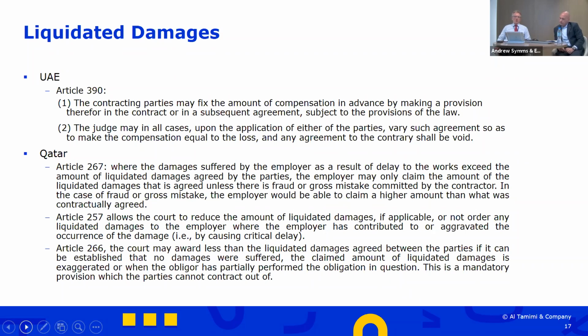In its unamended form, what it says is that the liquidated damages are to be the exclusive remedy, and that's wholly for delay, and that's wholly consistent with certainly a common law interpretation. Yet FIDIC, interestingly, then adds a few extra words, which says, except in a case of termination by the employer. So, back to some of those thoughts that Ewan was expressing relating to the dangers of termination for a contractor, that potentially, if there is a valid termination by an employer, the apparent protection of the liquidated damages figure may be removed completely so that there is an exposure to general damages. But then there is another important aspect from the employer's side, and Ewan's already addressed it, and that is get your liquidated damages claim in, coupled with whatever you might be able to do in relation to your bonds, before you terminate.